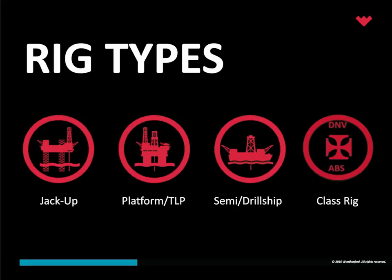It makes sense to try to optimize that so it's quicker and easier to install, particularly in regions like Norway or the UK where we don't want to engineer and install it when it gets to the rig. It needs to all be pre-built, pre-engineered, pre-tested, and pre-approved so that it's very quick to install when you get offshore, because there are many layers of regulation and inspection in order to get it approved for use. We don't need to be shutting down production on platforms; the whole point is to put more tools at their disposal and do it quicker.